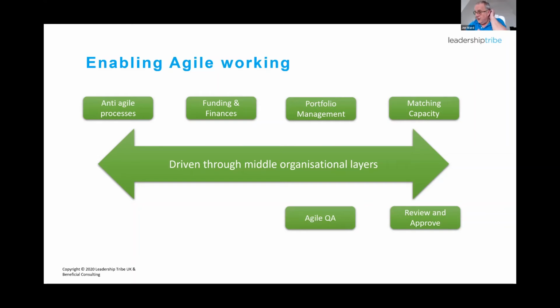The other thing which is really important is to think about Agile QA. All of the QA processes that we use for the development pipeline typically use something called the V model. When you start to break that V model down and say, no, we're not going to have a functional spec, so you therefore can't use that to drive the user acceptance test, then you need to rethink the whole Agile QA approach, using things like TMAP Next for Scrum and test automation in order to get the quality of the deliverables at the right level.